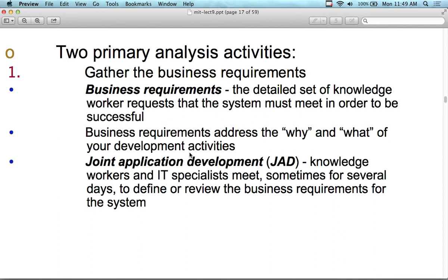You don't know anybody in the HR department? Then you could do a JAD session. You don't have an HR department yet. So it's JAD, Joint Application Development. You bring in a bunch of HR managers from 5 or 6 different companies. You sit them down at a table together and say, hey, what kind of challenges do you guys have in your department? You ask them questions. JAD people are generally coming from the outside, and they're coming from cross disciplines.